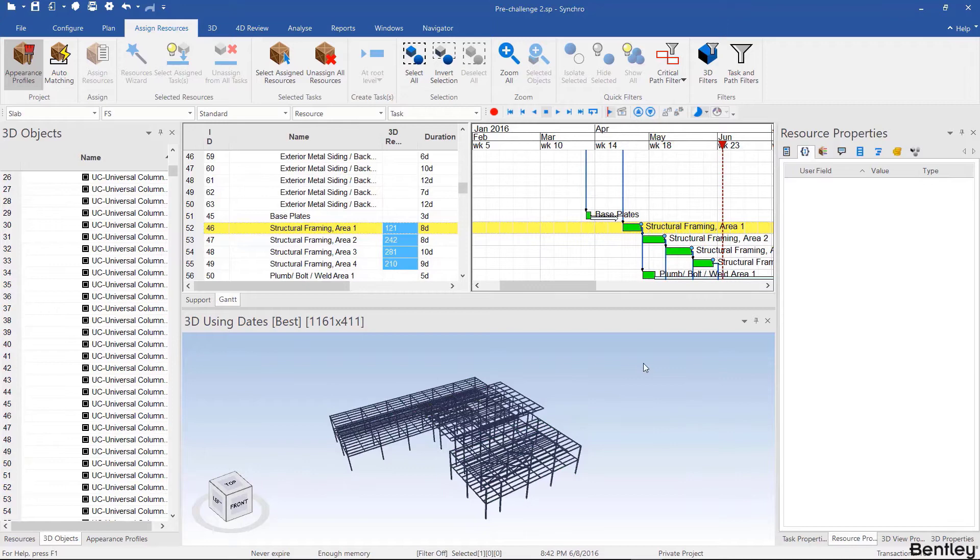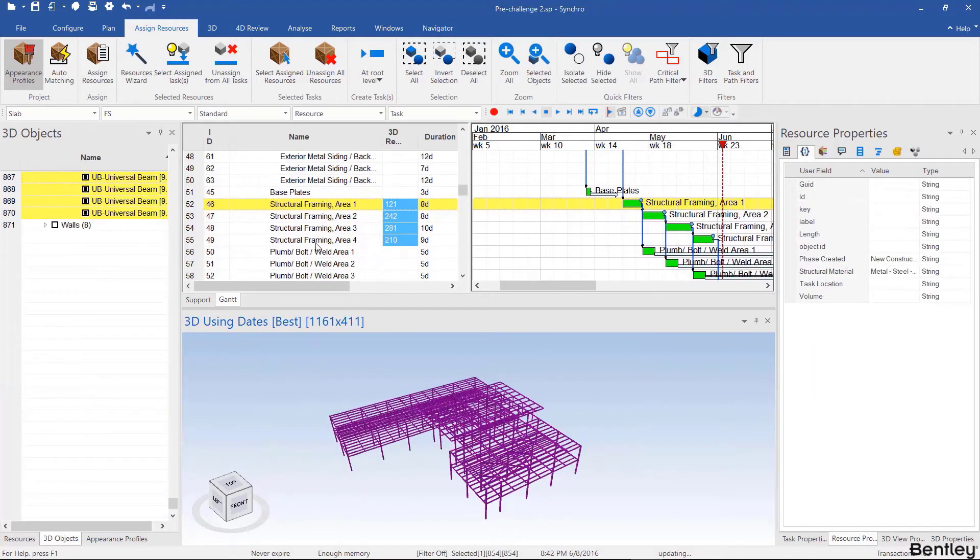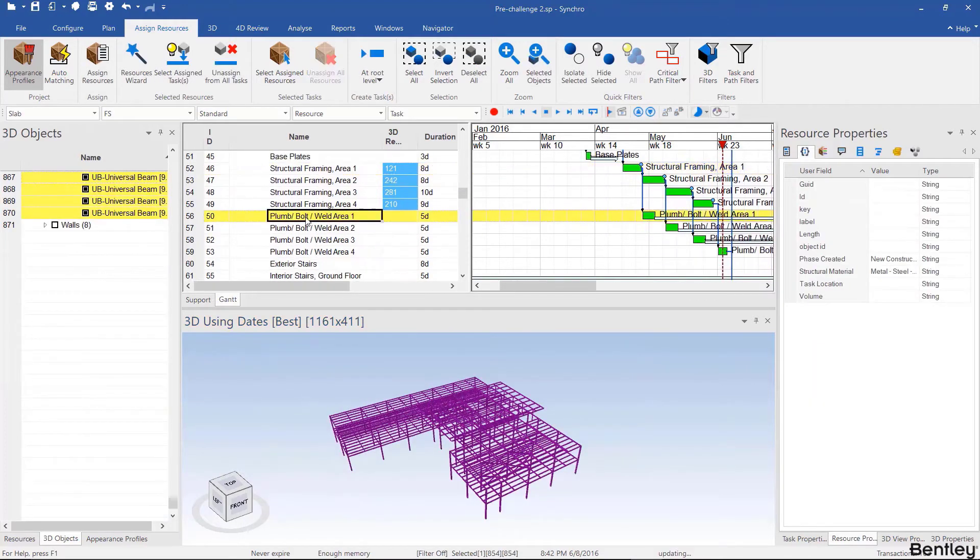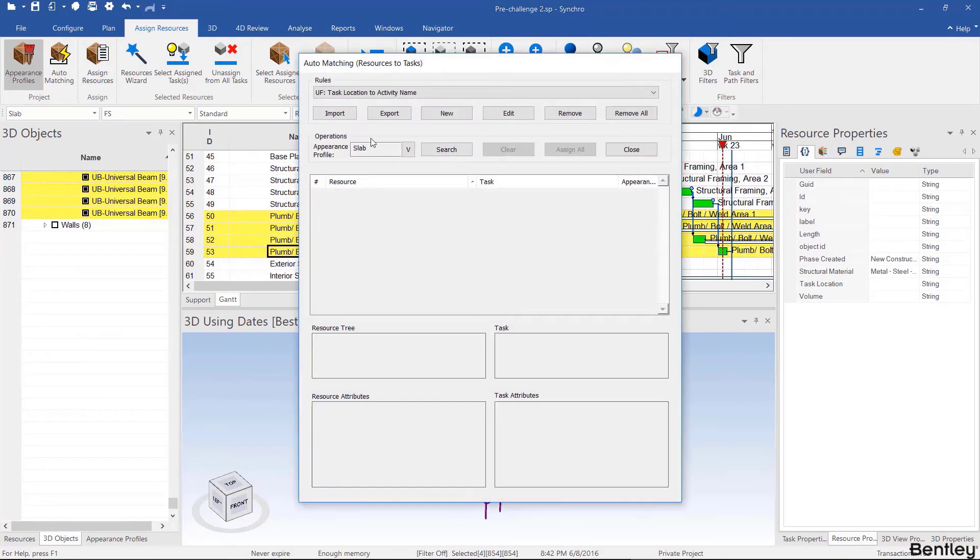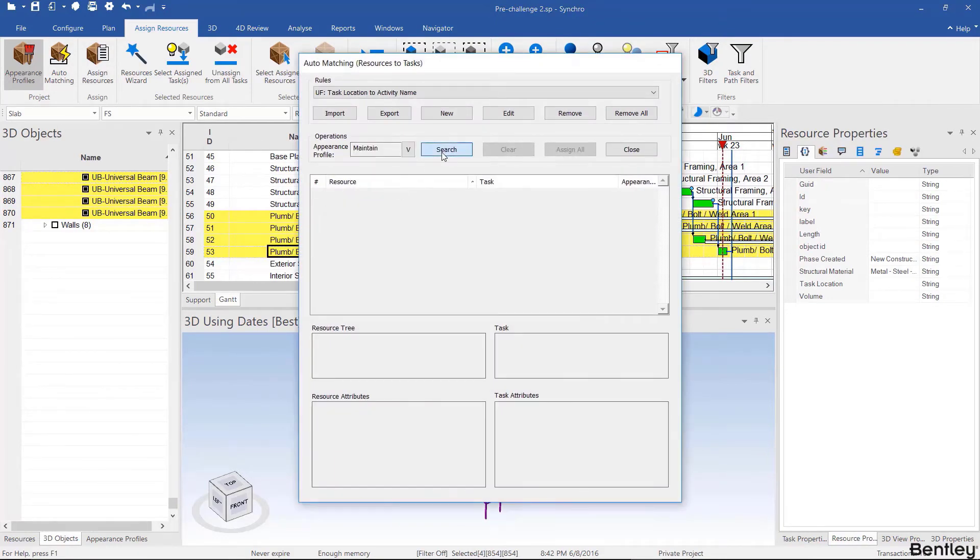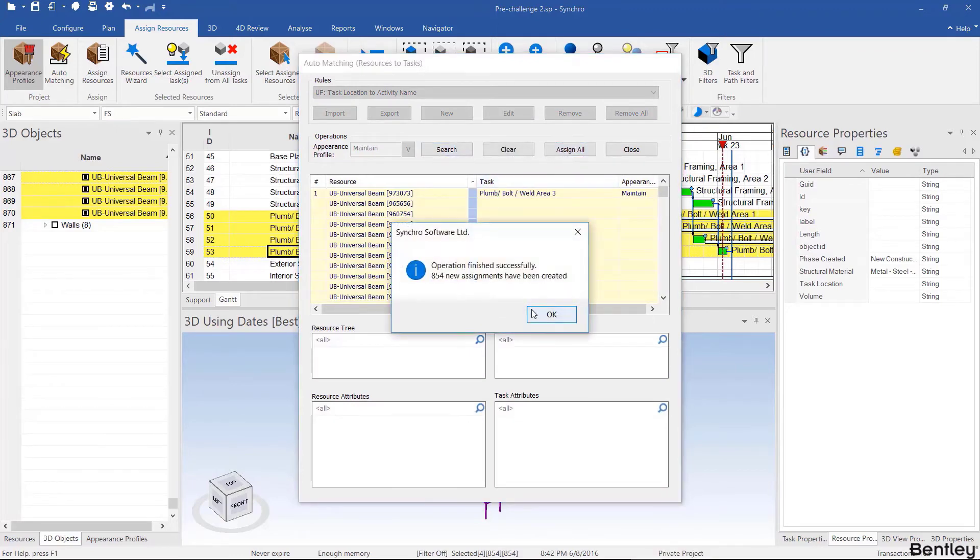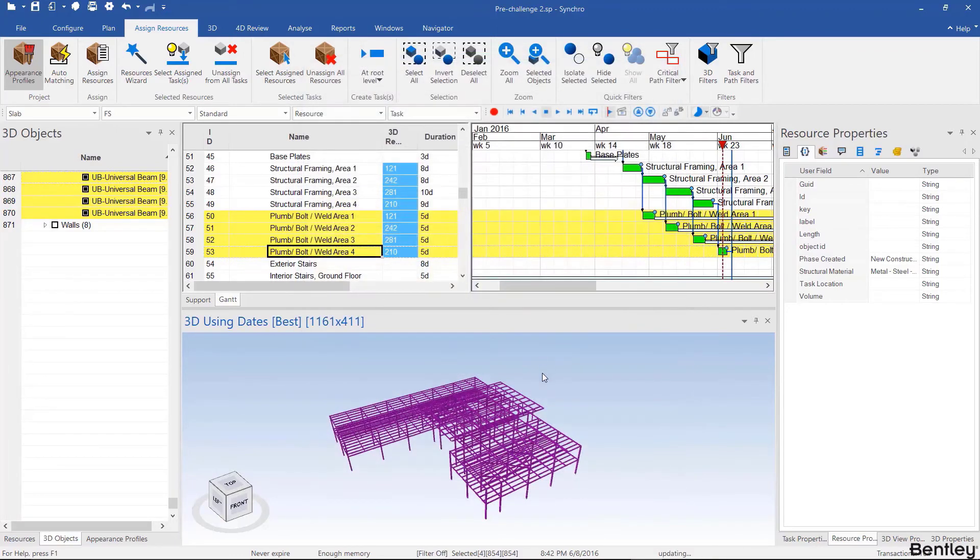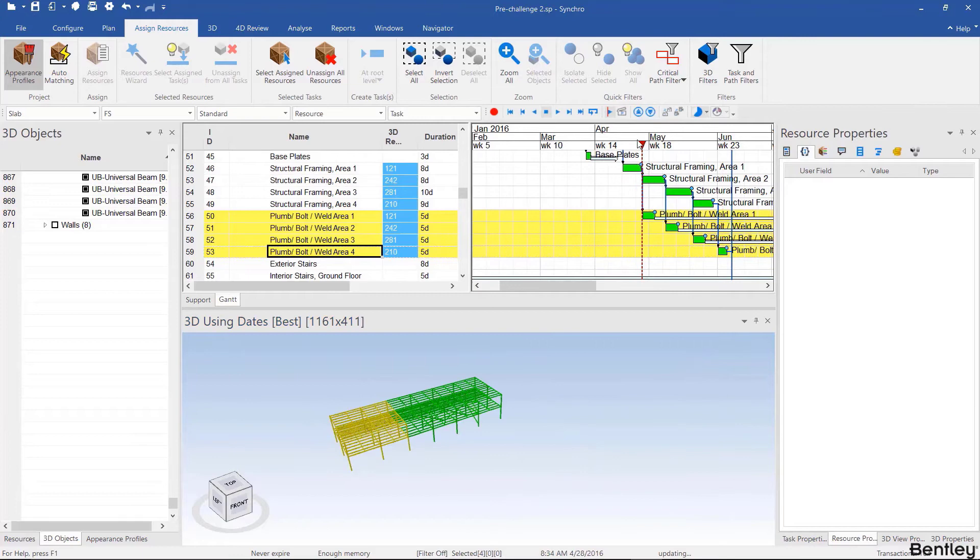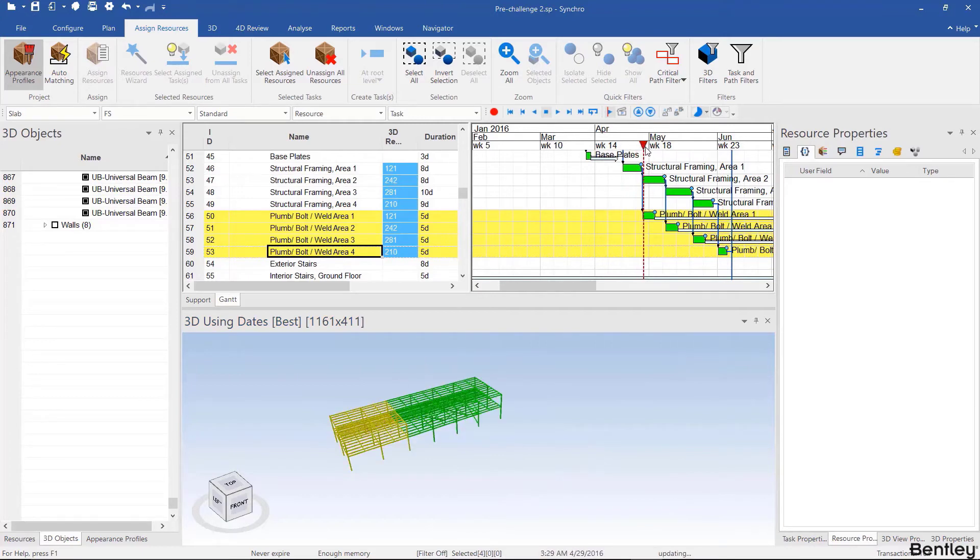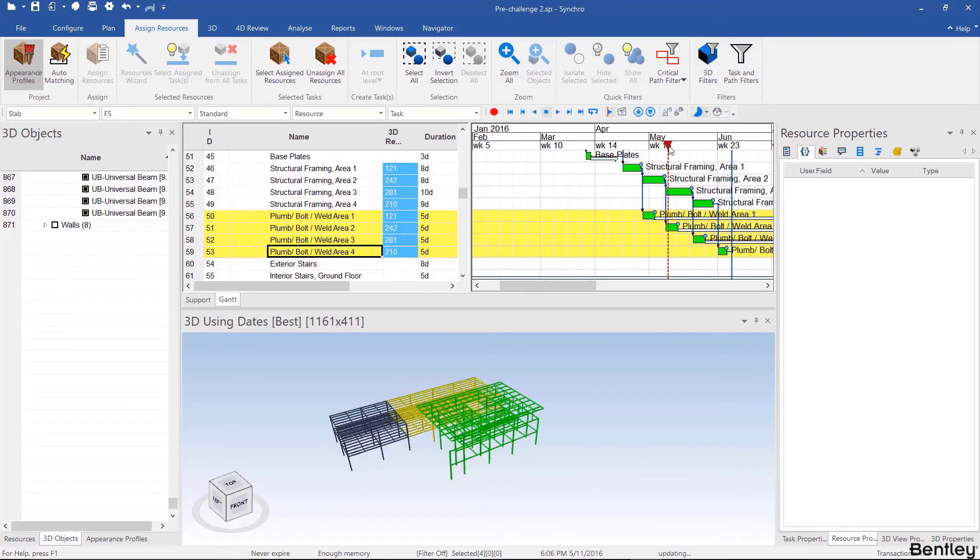I can select these again and now select the plumb bolt weld area one, two, three, four. Run the auto matching rule again, however this time I'm going to use maintain. Search, assign all, and then drag the focus time. Notice that while it's erecting area one, nothing's happening. Then while it's erecting area two, it's plumbing and bolting area one, etc.